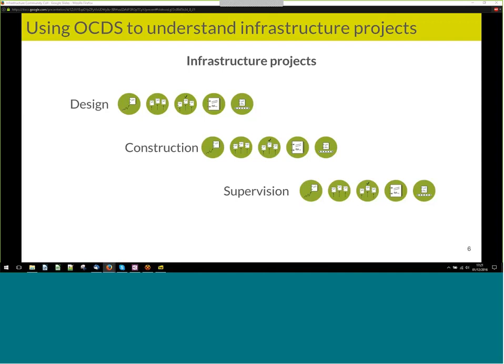Well, there is also a thing if we, for example, have in road construction OPRC projects, which are performance-based projects, then construction can be connected to maintenance, and then the constructor has to maintain the road. Yep. But sometimes when you finish construction, that's the end of the project, and maintenance is the object for another tender procedure, and it's a completely separate contract.